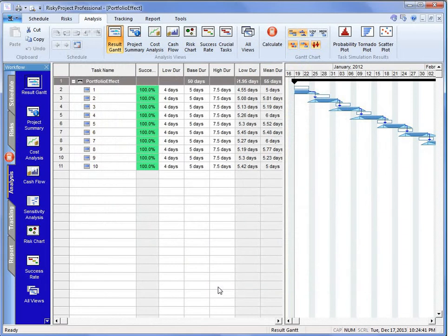And if we take into account our previous video, part 3, where we showed the effect of parallel activities and the merge bias, if you have a large complex project, you will have a large precedent network in combination with many parallel activities. The combination of the two can often show you that there'll be about a 20% increase in the expected duration of your projects. And if you don't run the Monte Carlo simulations on it, you will never see or be able to understand what's causing it and how you can address it.